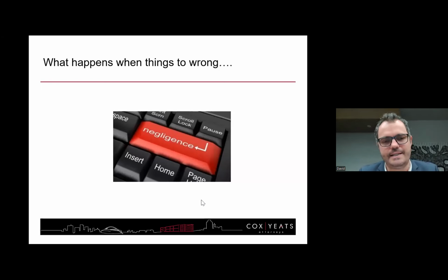You've got to look at the contract data, look at the special conditions, particular conditions, because now more and more, especially under the FIDIC Sunrail contracts, for example, which are the big juicy ones being handed out at the moment, the main contractor is being asked to underwrite the performance of the employer's engineer, which for me is bizarre, but we'll leave it there. So you've got to treat it on a case-by-case basis, and you've really got to dig down and make sure you're looking at the entire contract.